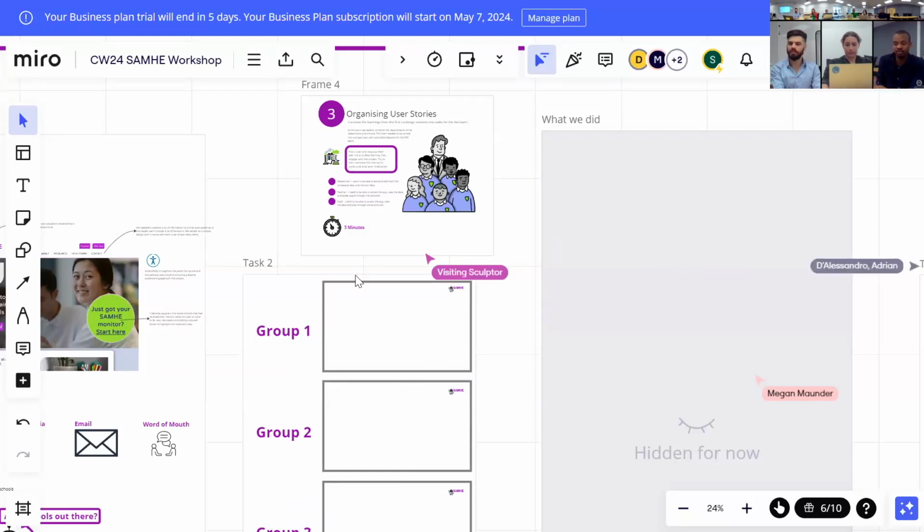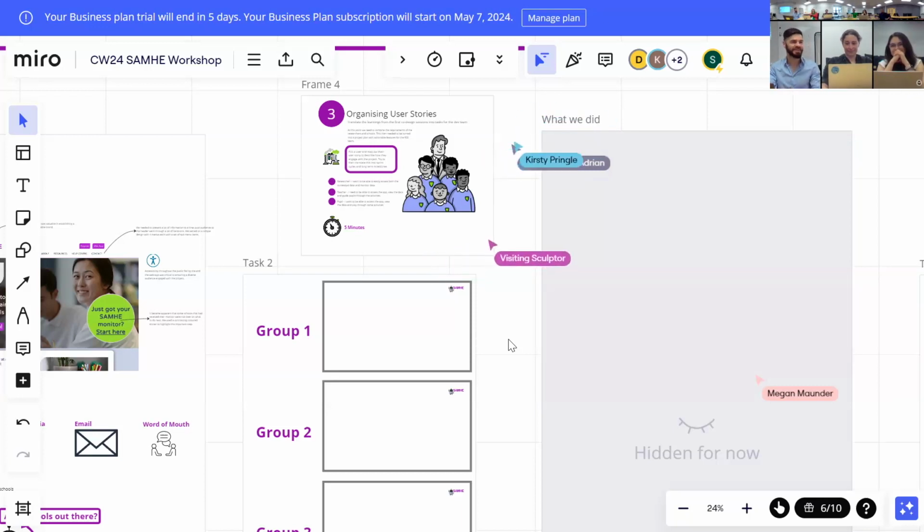One of the biggest difficulties of the project was that we never realized the length of time that the development process would take. The co-design phase had been blocked out as 3 months where we engaged with schools, and all that funding was spent in those 3 months. We barely even started building the app by the end of that. We'd been working on outlines and sketches, and then we had so many questions that I just wish we'd been able to talk to a school, even for 5 minutes. It would have saved hours and hours of researchers' arguments over Zoom calls.